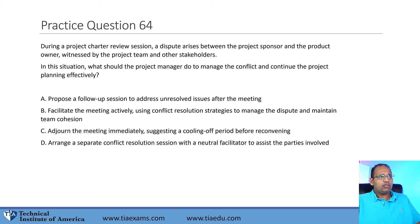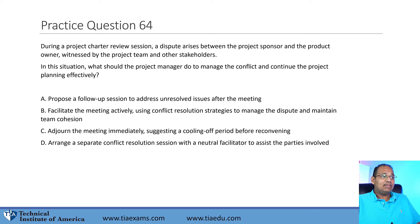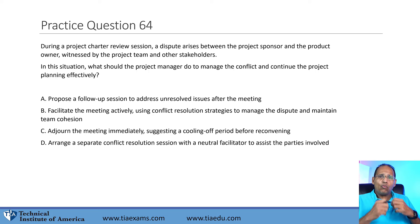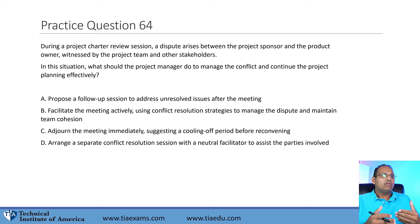Question 64. During a project charter review session, a dispute arises between the sponsor and the product owner, witnessed by the team and other stakeholders. What should the project manager do to manage the conflict and continue the project? A: Propose a follow-up session. B: Facilitate the meeting actively using conflict resolution strategies. C: Adjourn the meeting immediately. D: Arrange a separate conflict resolution session with a neutral facilitator. The exam wants you to take a direct approach and fix the problem right away. B is the best answer.